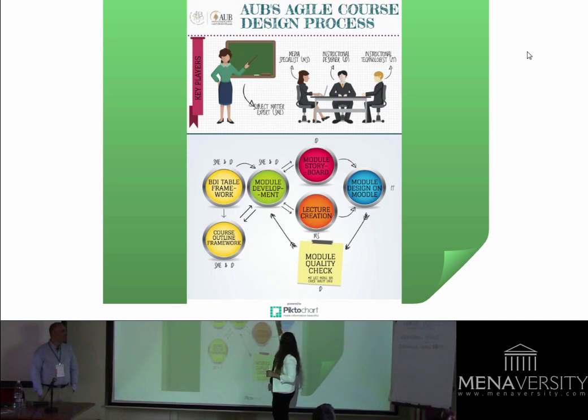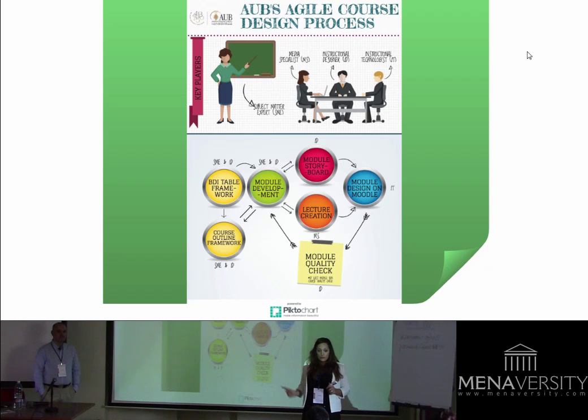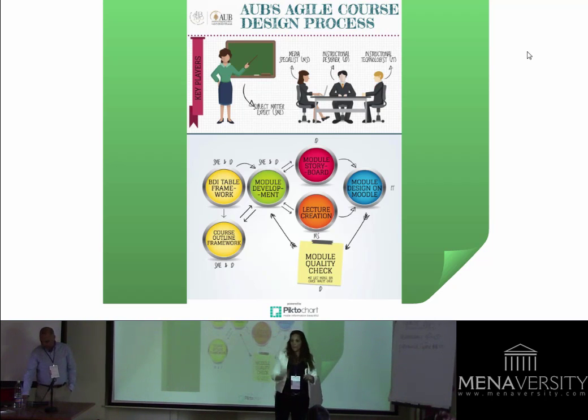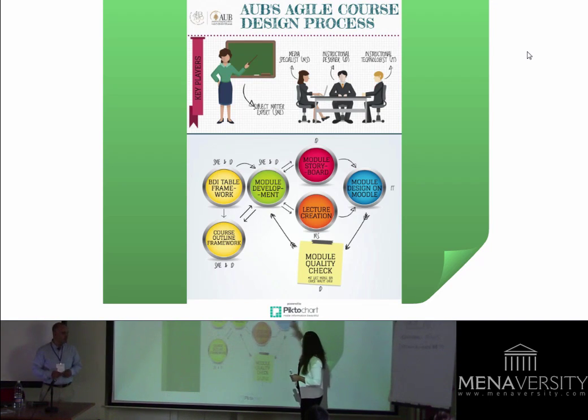And then we also added a new member, the media specialist, who is now in charge of building all the lectures, finding all the resources and animations, and really making the course interactive and engaging for the students. Notice how iterative it has become. We now just do the framework, learning outcomes and topics, that's it. Then we focus one-on-one on the modules, and they get passed on to the proper team member until they do module design, and then we do a module check.